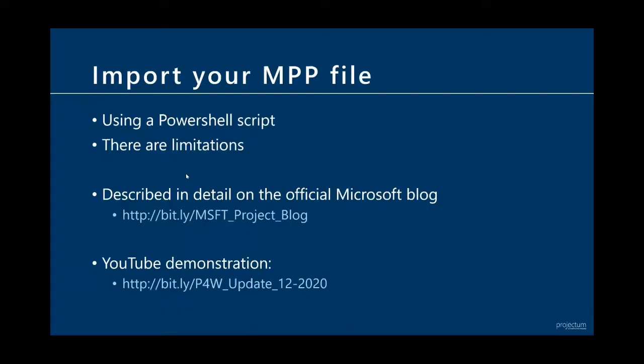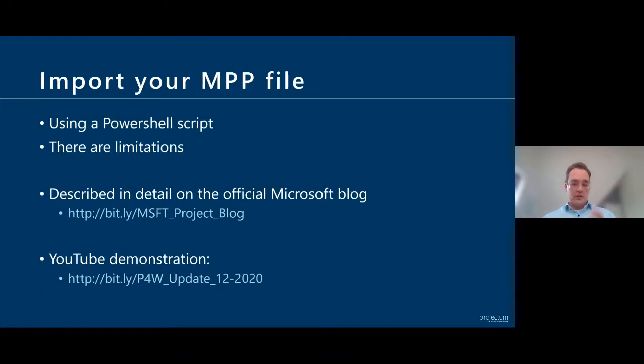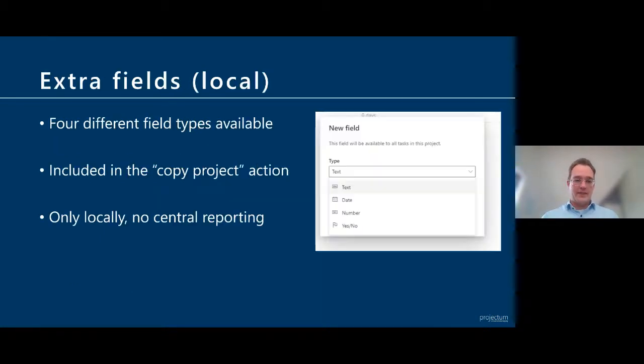Let's open up that presentation again. So this was importing a Microsoft Project file. You need to use PowerShell scripts. There are some limitations. Baselines, for instance, aren't retained. Deadlines aren't retained. But there is a detailed description on the Microsoft blog as well.